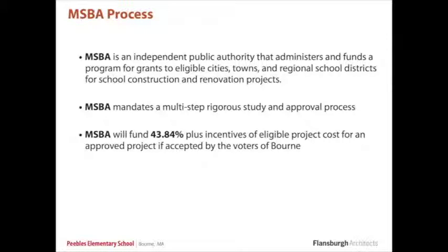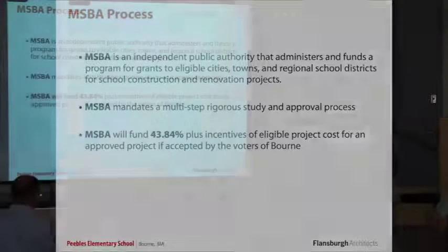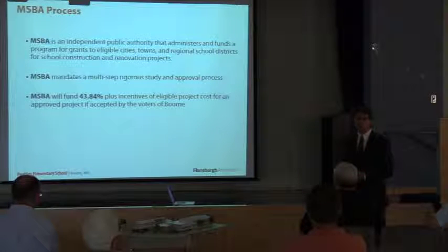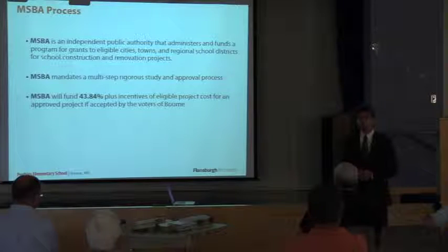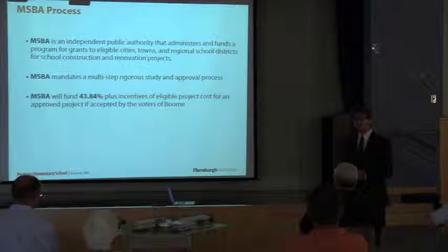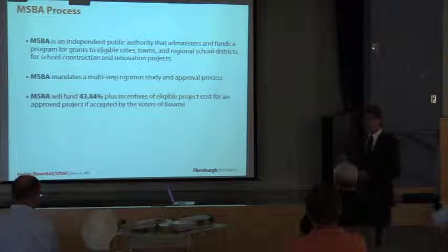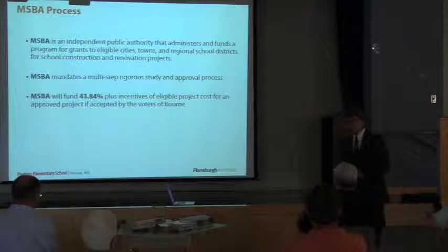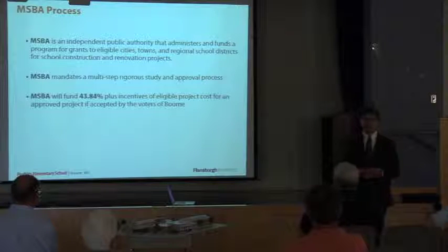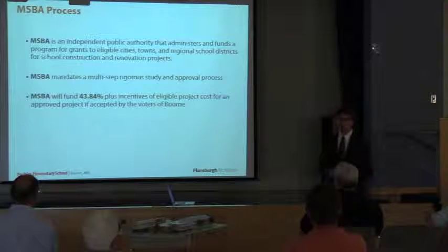They are a partner with all local communities, providing guidance, structure for the feasibility study as well as the design, and very substantive regulations and guidelines to follow for each community. If you follow those guidelines and those regulations in partnership with the MSBA, they'll provide a grant to each community. In our case, that grant will be 43.84% of eligible costs as we go through the project.